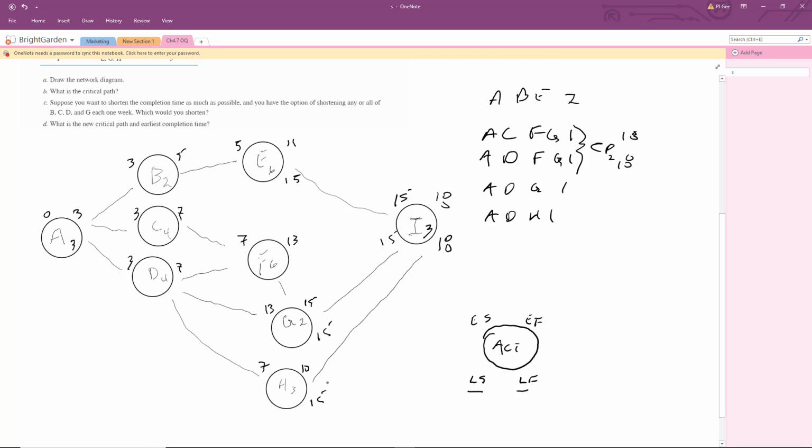or H. And you're going to notice something, that we're starting to see that the numbers above and numbers below, when they're different, there's slack time there. That's an early indicator that we're going to be able to slide E around a little bit here, because the first time through we tried to start everything absolutely as early as possible. And the reason we're going through backwards now is to see how late we can start anything here. So to finish on the 15th week, we'd subtract 6, we get ourselves 9. Okay, so we can start as late as the 9th week. We have what, 4 weeks difference between early start and late start, and we can start E anytime in between there and still come out at the right time. That's why we're looking for the slack time there.